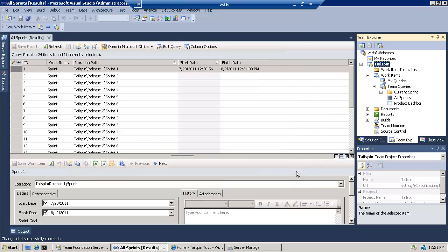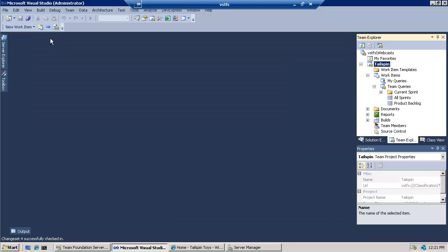Okay, we're getting to the area here. We're going to create a quick definition of done, and then we're going to start managing some work. So in Scrum, there's this thing called the DOD, or definition of done. It's an auditable checklist that the team sets up to know when they're done coding a bug fix or a new feature. It's got things in there like all my unit tests pass, we have at least X% code coverage, everything's been code reviewed, it's checked in, it's labeled. So in other words, you're not done with that feature and ready to show it to the product owner at sprint review until the team has checked off all of those definition of done items.